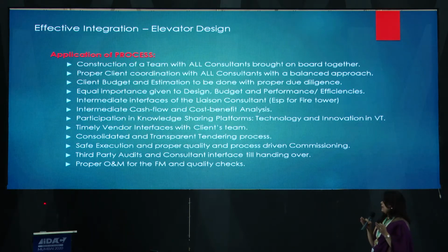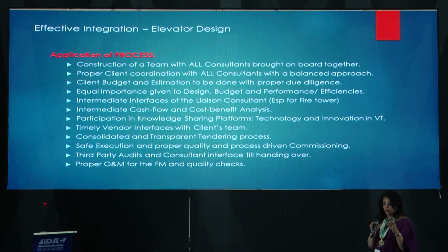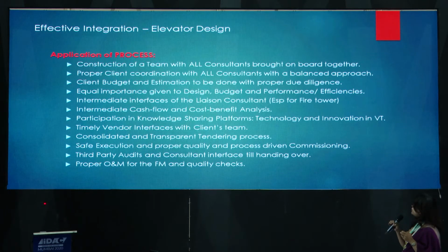You should ideally get all of them together, because the question about your sizing and things like that, a preliminary analysis which comes from the VT guy, would go in on day one, and it would not come in so much later, and then you would have efficiency and performance issues. So all the consultants is very key. Then the proper client coordination with all consultants with a balanced approach.